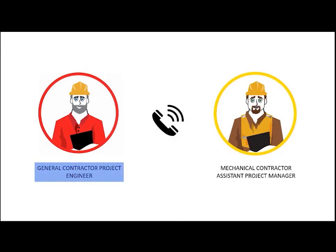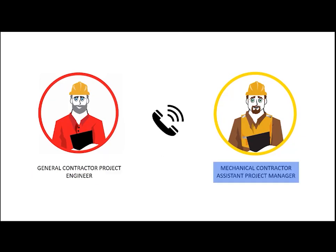Hey, just wanted to give you a call on this air handling unit submittal and let you know that I want you to go ahead and release the one for the basement. The structure isn't going to weigh down anybody and I don't want you to get covered up before you can set with the crane. I'm on it. We'll release it today and it will be on site in 10 weeks.